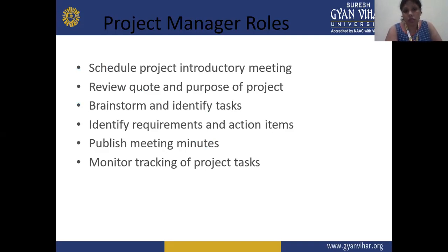The project manager schedules the project introductory meeting. It reviews the code and purpose of the project. Then it brainstorms and identifies the tasks. It identifies requirements and action items. It publishes the meeting minutes, and it monitors tracking of the project tasks.